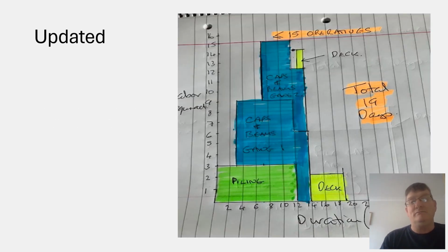All right, look, I've got up to my 15. I've got to be careful, I can't go above it, you know? Less than or equal to 15 operatives, it says, okay? But look now, everything on that graph looks more vertical than horizontal. And I've managed to do it.